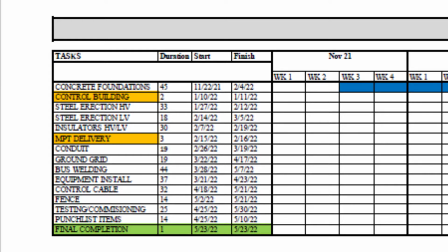In a pure sense, phases are just titles for each group of similar tasks contained in the project. So, under each phase title, we'll list all the tasks required to complete that section of the project. I'll also add that a phase of construction might only contain one task, and there's nothing wrong with that. That one task might even have the same name as the phase.